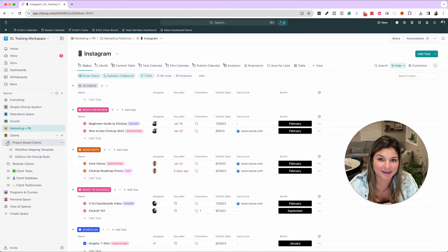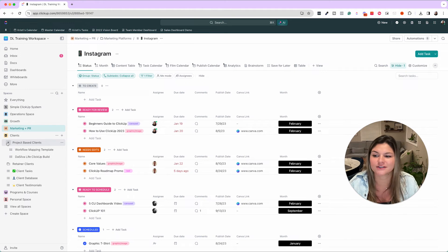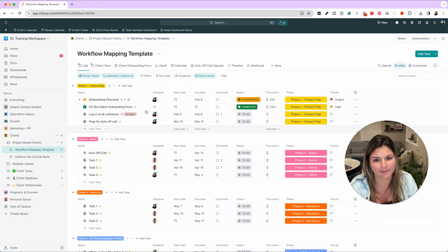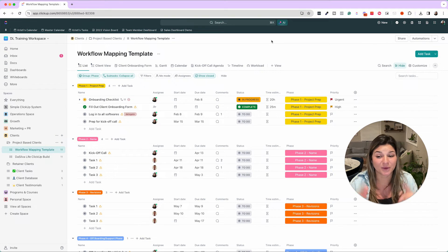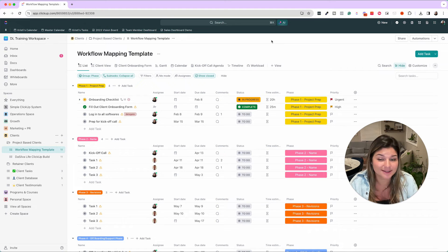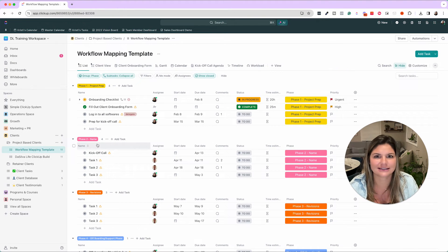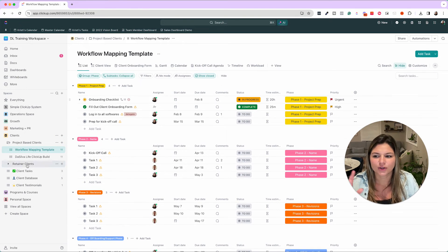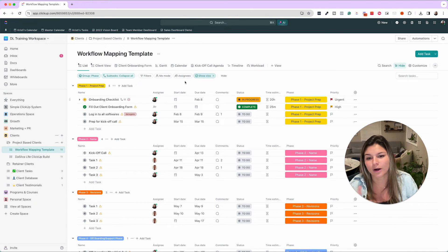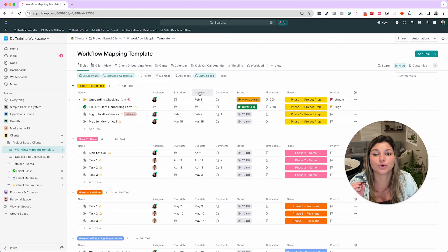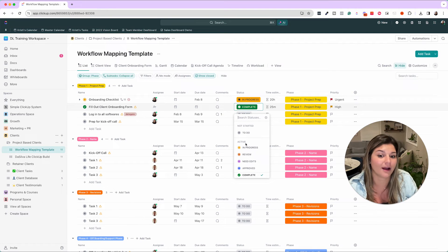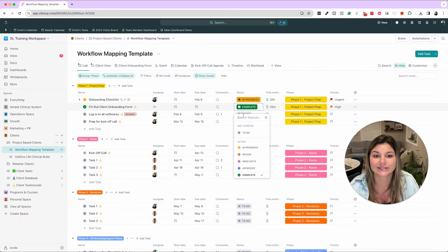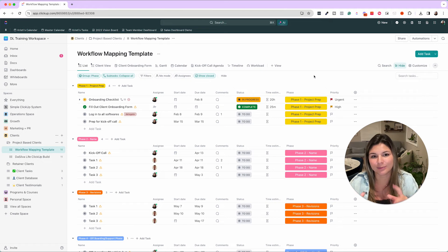What about clients? You can have project-based clients, retainer clients, consulting clients where you just do strategy sessions, whatever it is. Let me show you our workflow mapping template. This is an example of one project that has a start and end date that's grouped by phases. We use this exact template for our system builds. Obviously it's unique to us. We have unique project phases for that build and standardized tasks and timelines, but you can see how you can have an entire project in one list that's really nicely grouped by phases. Who's doing what? What are the start and end dates? Even if it's just you and you're a solopreneur, you can totally use this just to manage your own process for the project, or even see if there are things that you're waiting on client review for. This is a way where you can use statuses and dropdowns to still know the status of the task, but group it in project phases.